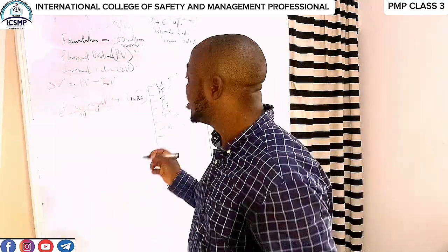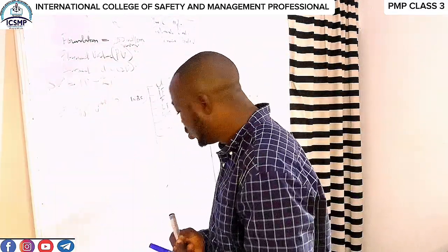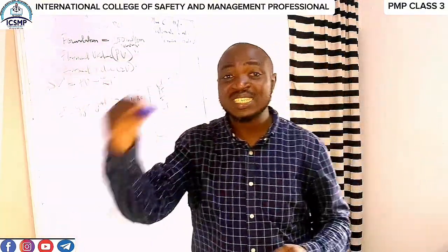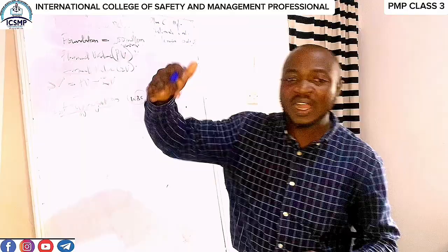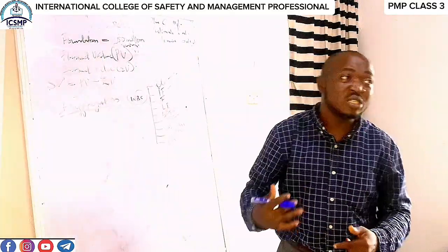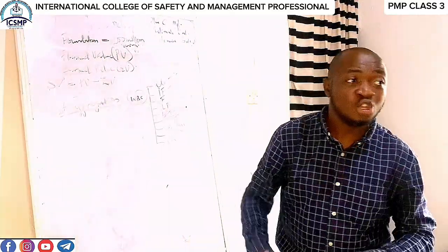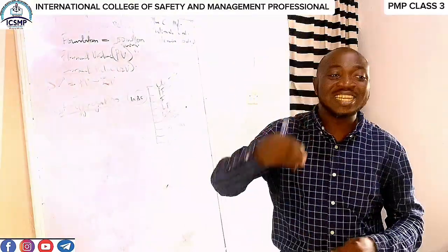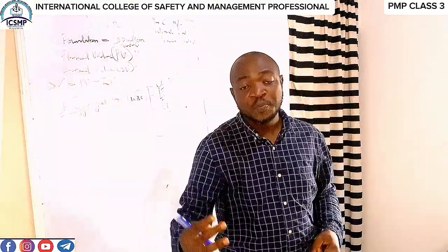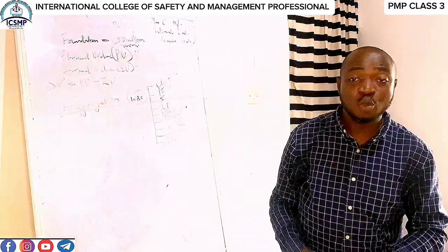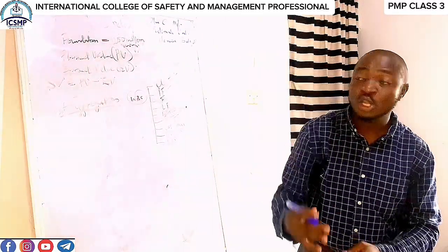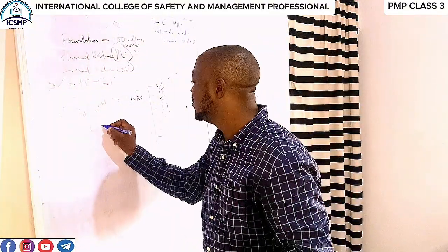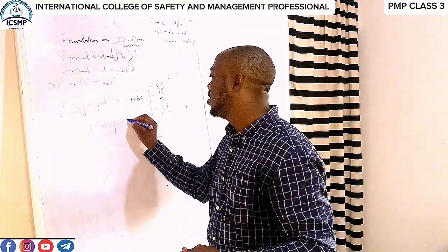You know, under risk management, we say we have known unknowns and unknown unknowns. We have two types of risk: pre-identified risk and unidentified risk. For example, if you are doing a construction project, you already know that maybe during a rainy season, there's risk that rain will stall work. That's a pre-identified risk. We already know that it is possible for that to happen. The cost that we reserve for this kind of risk is what we call the contingency reserve.